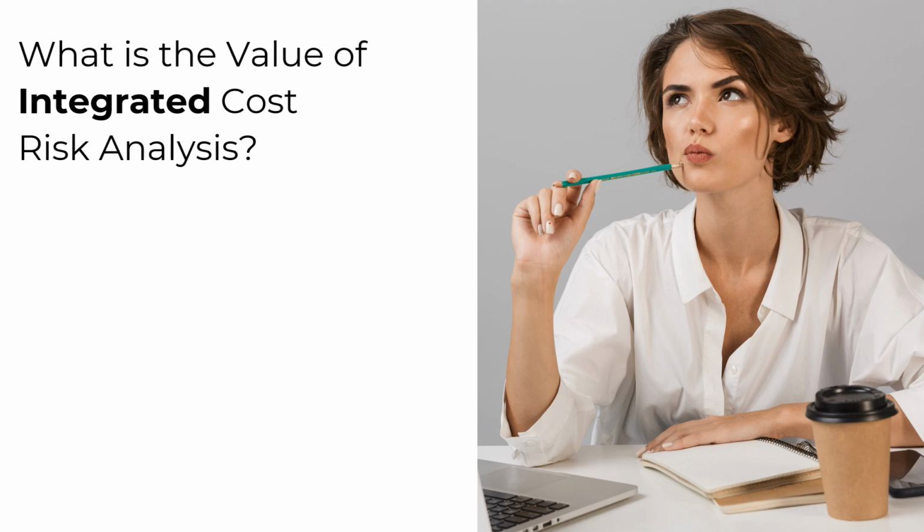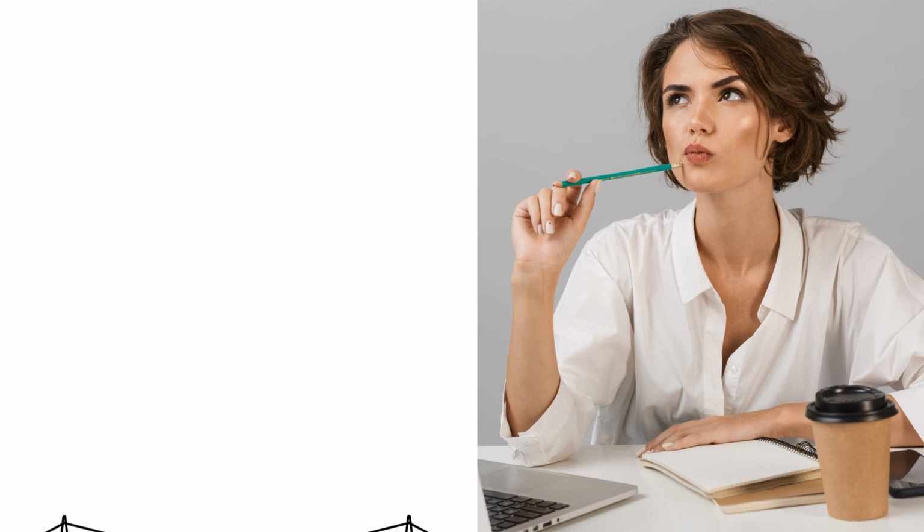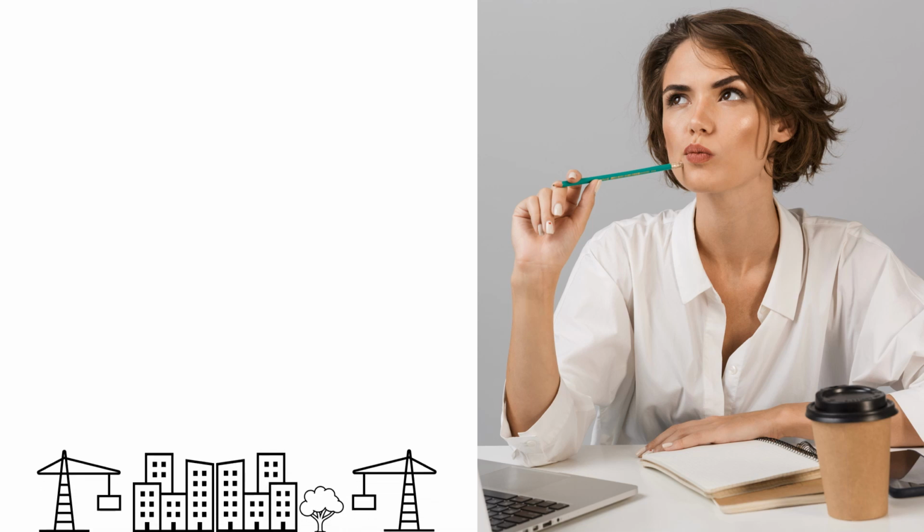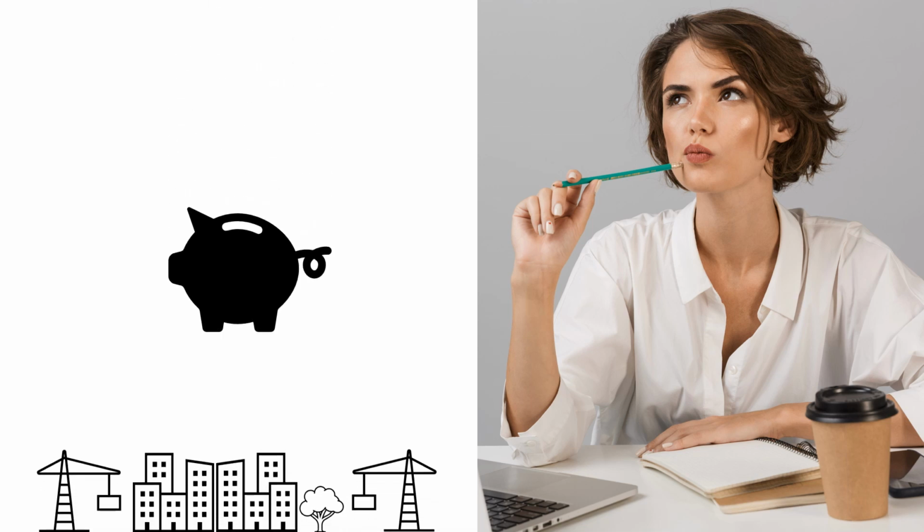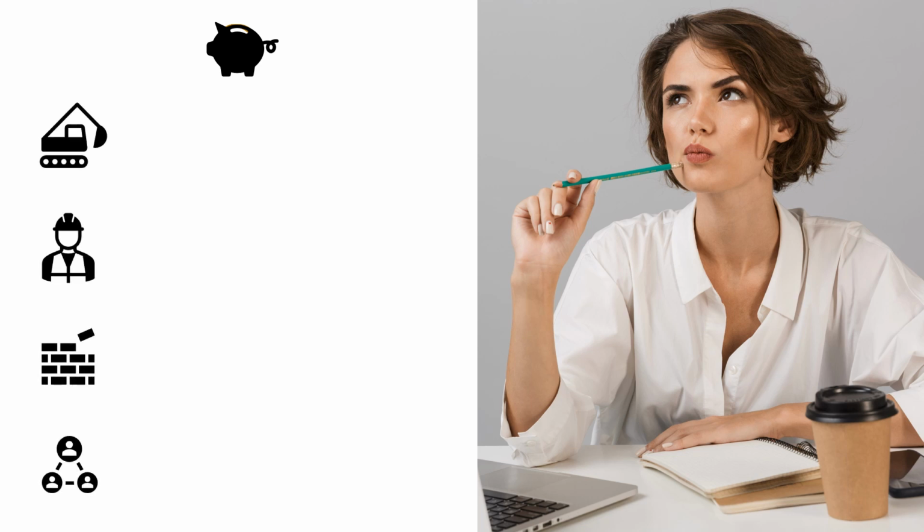When starting a new project, a budget needs to be estimated and made available. This budget should include a contingency for expected and unexpected additional costs to increase the feasibility and secure the robustness of the project. Included in the budget are different cost elements such as equipment, labor, material, and overhead costs. The total budget is derived from the costs for each of these elements.